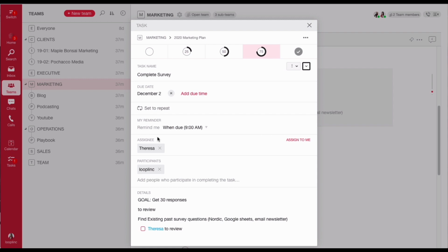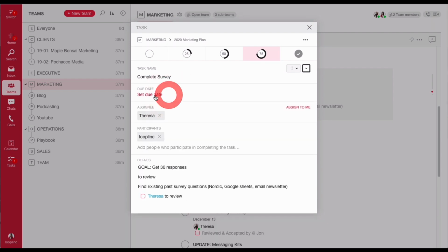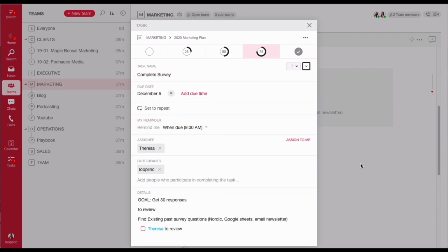All right, so let's talk about past due tasks. The key component is to always update it, even if it's past due. This notifies the team that although the original due date was missed, it's rescheduled for completion. Don't let a task live in an overdue state. This bypasses any urgencies and conditions you to ignore the red dot on your screen.